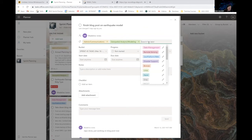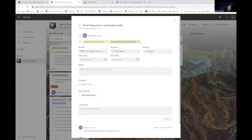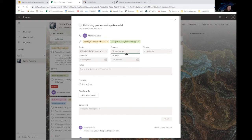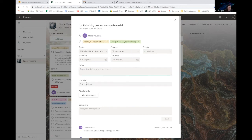Every card has to have a label, and we like to label our tasks by the topic of work it falls under. You can also assign a priority to your cards, whether or not you've started or completed the task, and start and end dates — this is useful if you want to convert your Kanban board into a Gantt chart and some kind of progress report. You can include descriptions as well as put a checklist, so if your task has subtasks, you can break those down. Our team will always add an attachment to a completed card — you can add files, images, and comments.